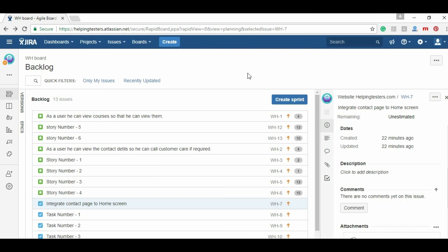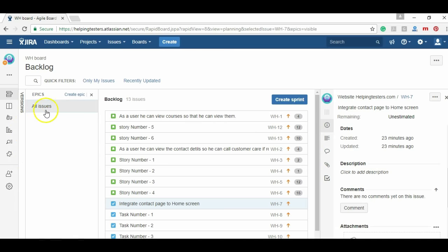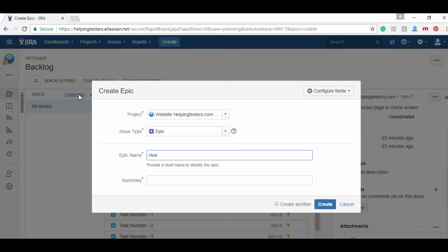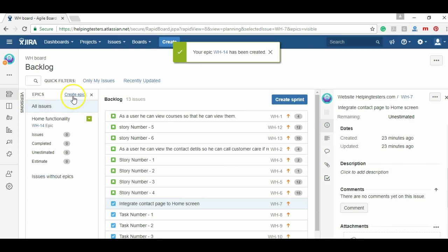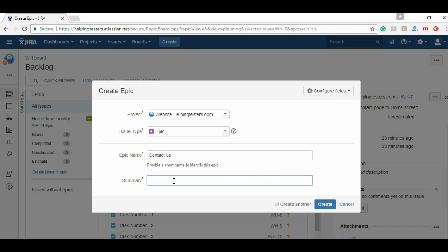The sample we have taken before was realistic, but when you work from end to end, it will give a more detailed view how the process goes. So we have added the number of hours for each story. Now we have identified it. Now what product manager will do? He will divide into various versions and epics. Now what are epics? As we have told that epic is a main subset. For example, in this project, what we are doing? We are developing a home screen and a contact screen. So there are two epics. It is not necessary that each epic should close in one sprint - epics go in multiple sprints. So you can create an epic from here. Let's say one epic should be home functionality epic.